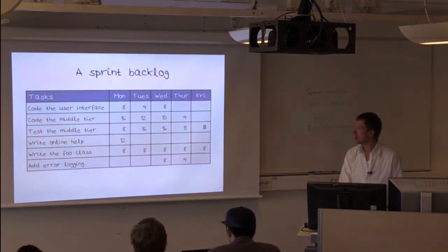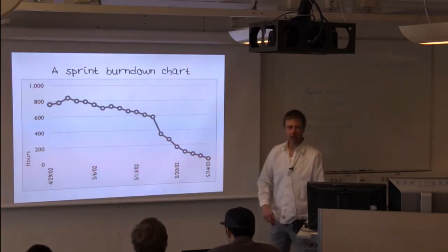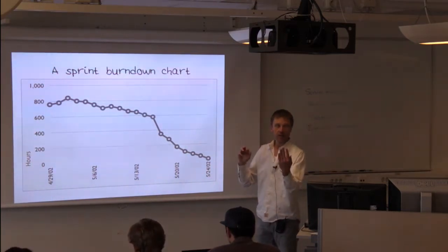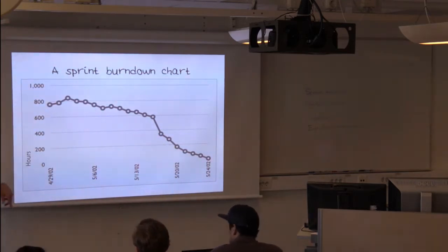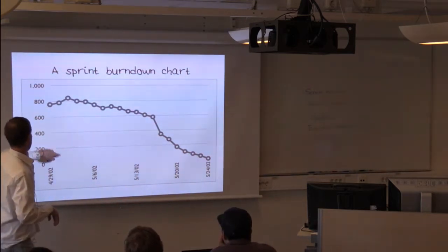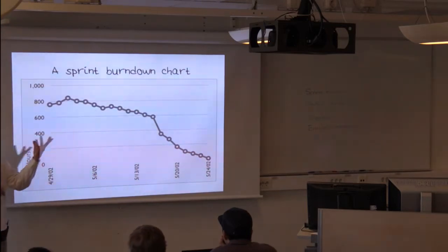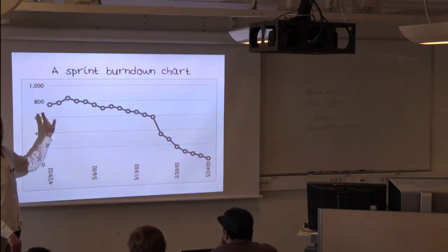And so it continues. And now, this is a sprint burn down chart. So this is another artifact that's being extracted from the time estimates of the tasks, right? So this simply says that on 4/29, April 29, 2002, the total number of hours that the team has estimated remains for this sprint is like 760 hours or something like that. Might be a day later, yeah. A day later, clearly the team has done some work, but they have found new things, or some of the tasks they realized were bigger than they originally thought. So now we have 780 hours left, despite having put in time.